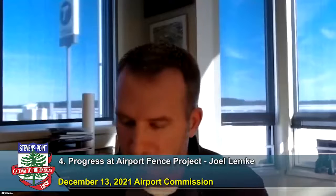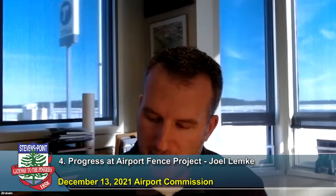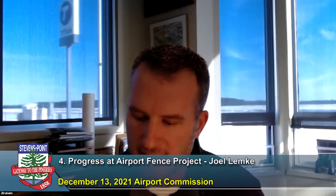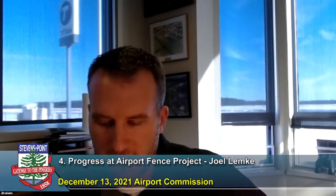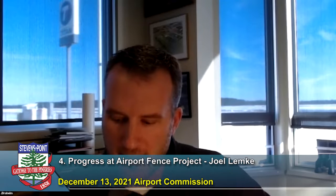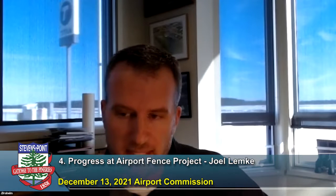Sure. Good afternoon, everyone. Just to give you an update on where we are with the fence project, we've entered phase 1 of the project. Clearing crews from Interstate Tree Clearing Service mobilized on the week of November 22nd. And the clearing commenced on November 29th along Wellfield Road. The project director decided to move along Wellfield Road in a northeastern direction, counterclockwise fashion around the airport.